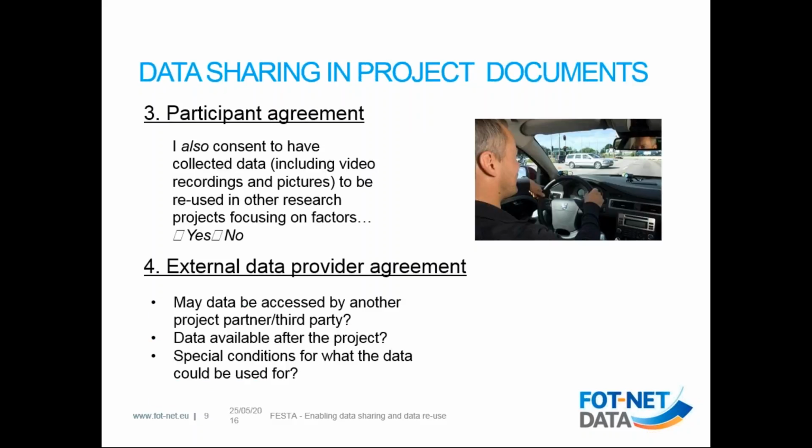And the third agreement is the participant agreement. It's important that the participant agrees that the data can be reused after the project. That is the main question that needs to go in there. And I also talked about the external data provider agreement.